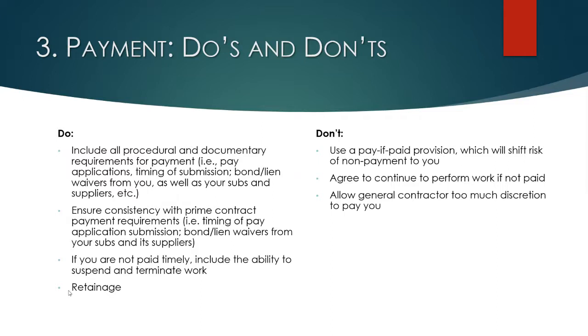Again, if your contract is incorporating the prime contract, make sure you understand what the prime contract payment requirements are. The timing of the general contractor's pay applications, the bond and lien waivers that have to be provided by you and your subs and your suppliers.